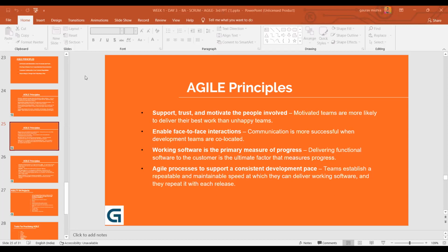So for example, if I have 10 requirements and out of which 5 requirements are submitted or delivered, then my plain math would be I've completed 50% of my work. Isn't it easy to understand this way? Yes, okay. Thank you.